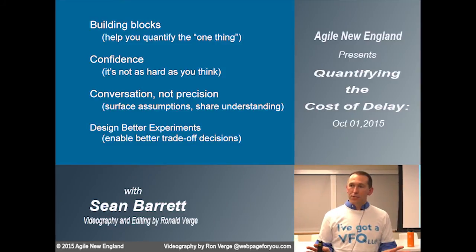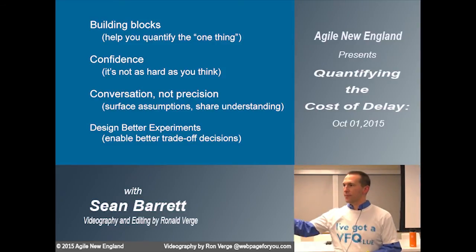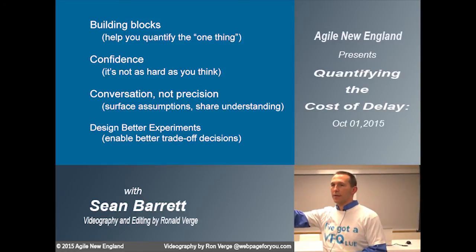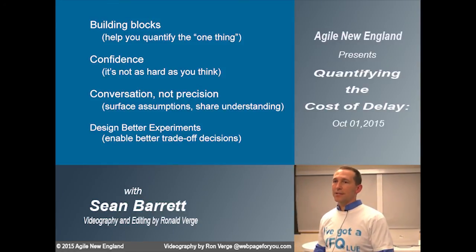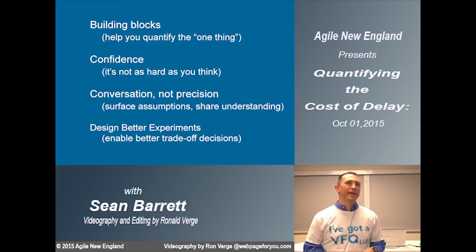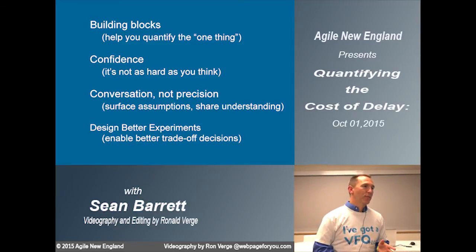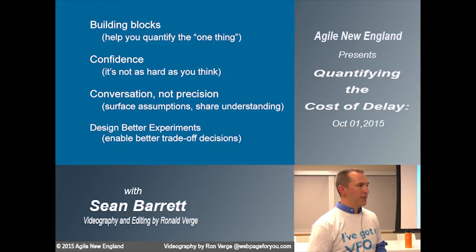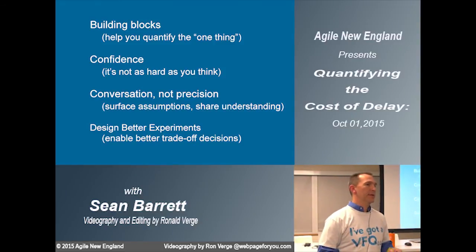Don't worry about precision when you're doing these. You're looking for the difference in 3 orders of magnitude. Now, 1 significant digit is plenty. Round off your numbers, make the math easy for yourself. And in the end, what we're really looking for is that ability to test, and test specifically the right things.